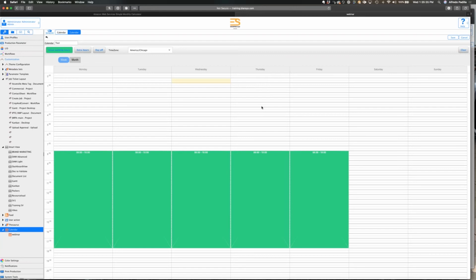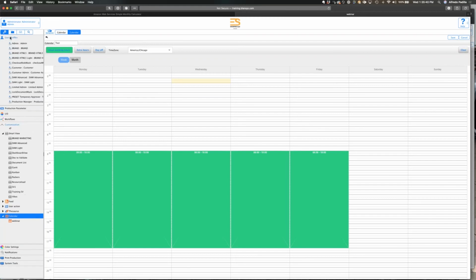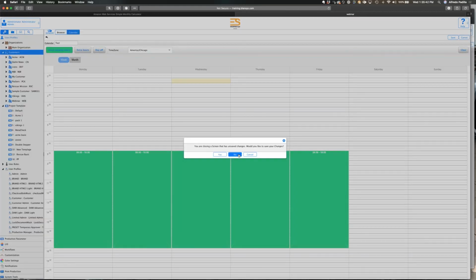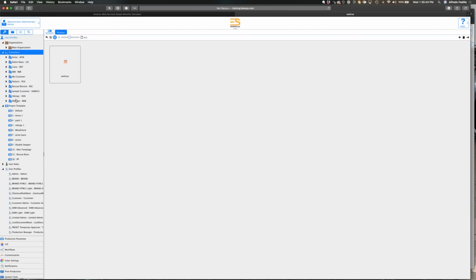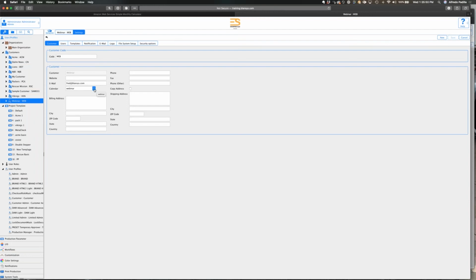You know, setting up the base one here, but the calendars, when you create customers now, so we don't need to save that. So I got my webinar customer here. You see that it's actually a calendar that you can define here. So for this customer, which of the calendars that I just set up do I want to use? I only have one, it's webinar, but if you want to have multiple ones, you can select it for different customers. That can even hold their time zone in it, so that you can manage that as well.